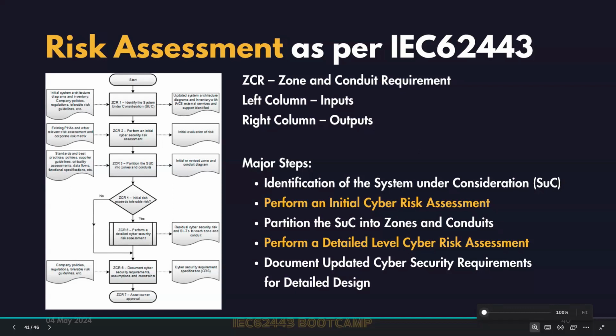If there are any gaps, you will note them down, because that will go as a part of the report. You will review the architecture, review the logs, and collect the network PCAP file or log files, syslog files, whatever. You collect all these documents and come back and do the risk assessment on your own, maybe with your internal team. And then probably you can send the initial risk assessment that you have identified to the customer.